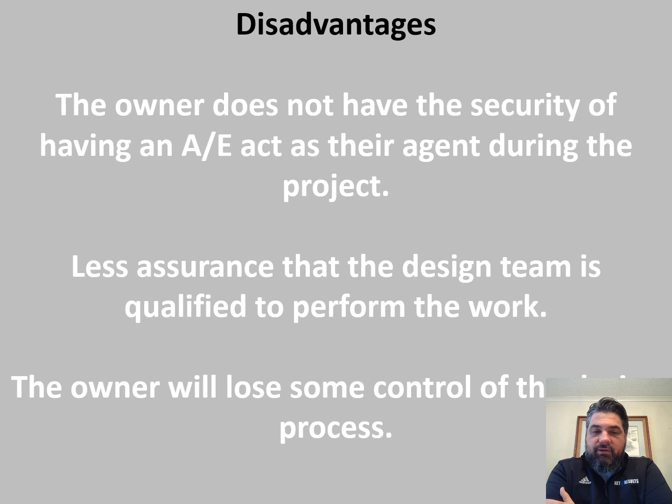There is less assurance on the owner's part that the design team is qualified to perform the work, because they are not hiring the design team. Since the owner is not hiring the design team, they're not really sure who's working on it, and if they've ever done a project of that type, scale, complexity, whatever the case may be. And so they have less control and say over that. And so as a result, the owner will lose some control of the design process.